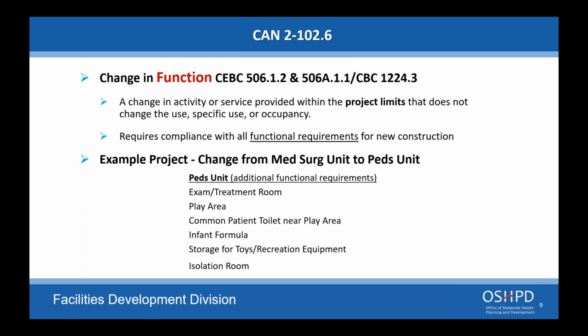If you're changing the function of the space, you have to meet all the functional support requirements for that space, such as we use the example of the med surg to pediatric. If you're not changing the function, and you're doing a remodel within a med surg to med surg and just remodeling the space, then the existing support spaces, even if you have an old soil utility room that's not being touched, you do not need to upgrade it. It goes to the example about the patient rooms that are out of compliance with current code, but were built in compliance with the code at the time it was built.